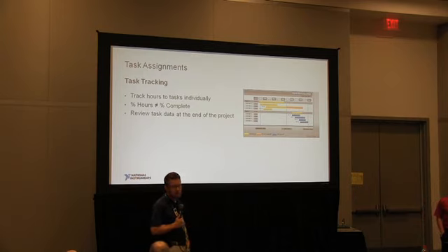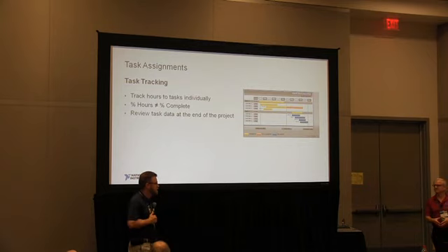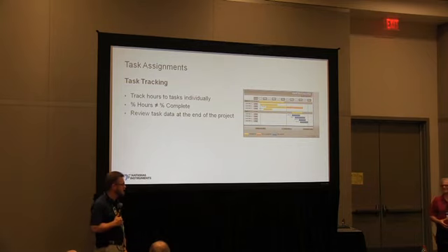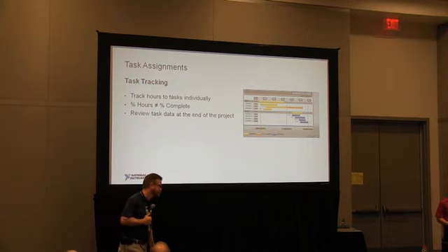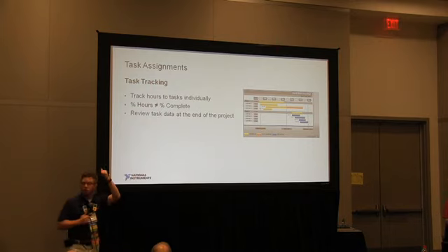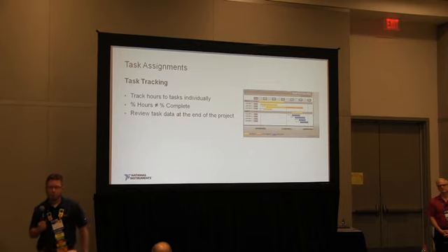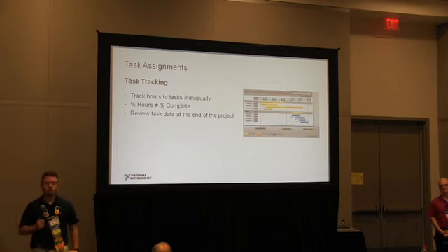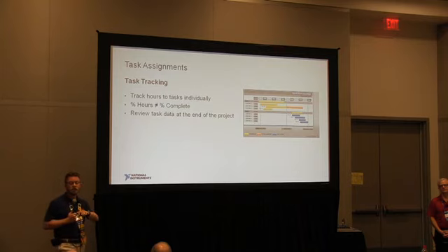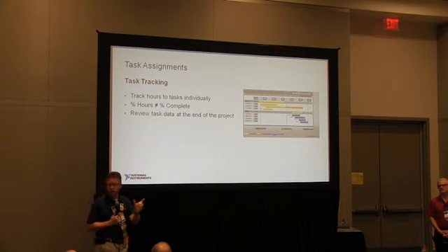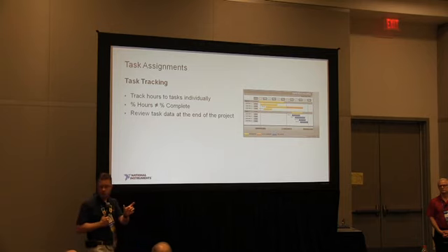Paul always tells me, don't estimate it like you're doing it. Estimate it like an average person is doing it. So maybe if you break down the task, maybe that will be more accurate to estimate the tasks beforehand, isn't it? Right. So the comment is, the smaller you break down that task, the more accurate that estimate could be. And I think that's legit.